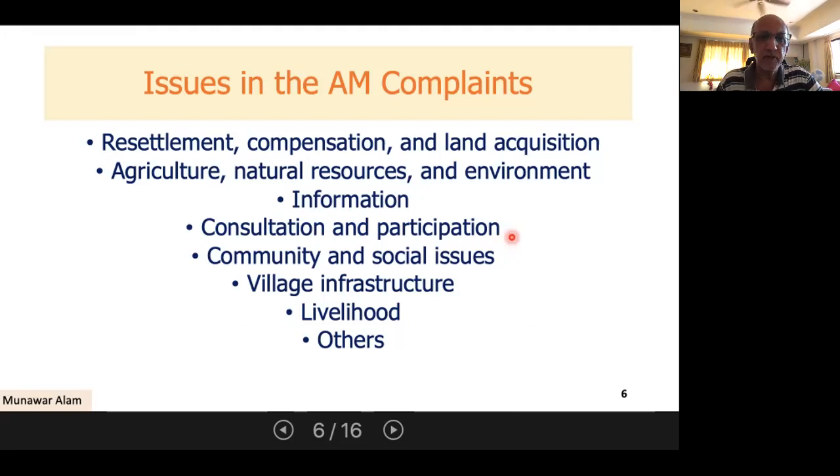So there was a complaint from a project in Indonesia, a road project, where indigenous people complained that they do not know much about the project, they have not participated. Now, ADB and the project authorities there said that everything is on the web. It's also in English, it's also in Bhasa. And these people then were saying, well, we don't even understand Bhasa very properly. We are indigenous, we speak our own dialect. So these are the practical issues.